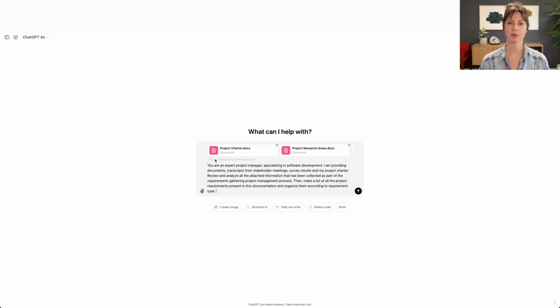You are an expert project manager specializing in software development. I am providing documents, transcripts from stakeholder meetings, survey results, and my project charter. Review and analyze all the information that's been collected as part of the requirements gathering project management process. Then make a list of all the requirements present in this documentation and organize them according to requirement type.